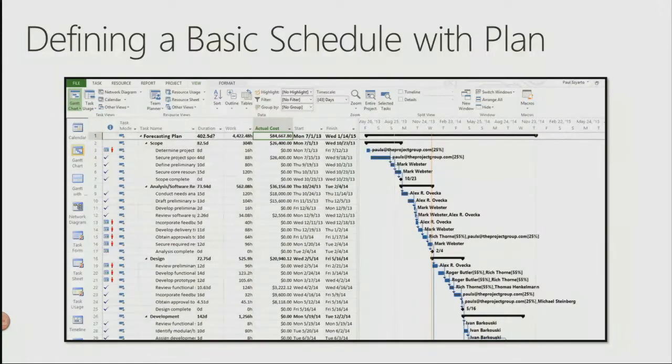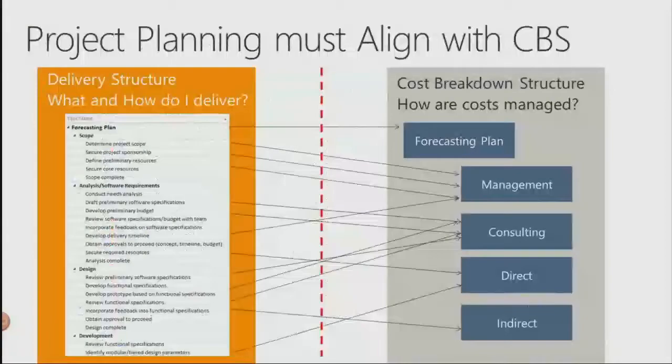From there, typically your CFO or one of your finance guys is going to say, okay, they're requesting this much budget, or this is their planning details. I guess they're requesting these budgets to execute this project. So typically they would allocate budgetary funds to execute this project plan. From here, this would align with what's called a CBS, cost breakdown structure, essentially, to where you have your schedule details, and we're aligning that with your cost controls within your organization.